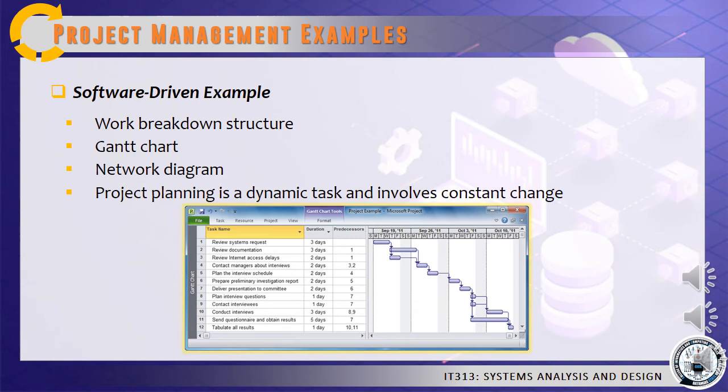Notice that Saturdays and Sundays are shown as shaded columns because no work will be performed on those days. The program makes these adjustments automatically. For example, Task 2, which has a duration of 3 days, starts on Thursday and ends on Monday.